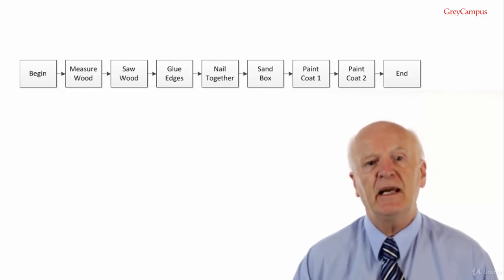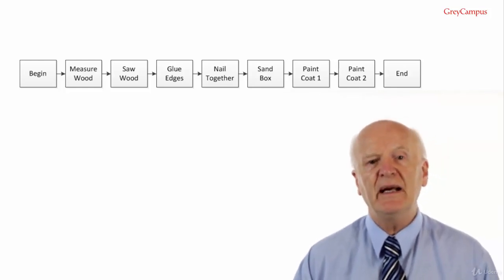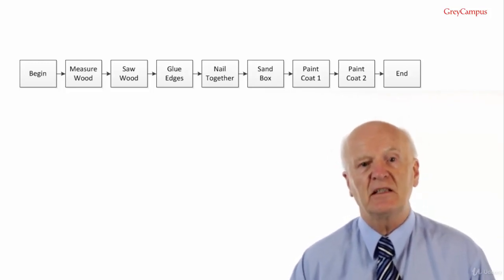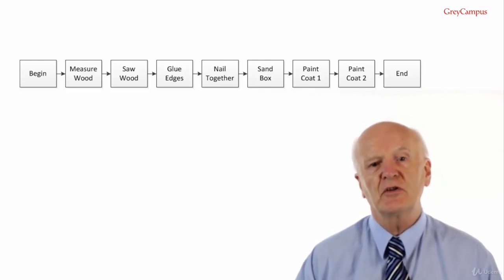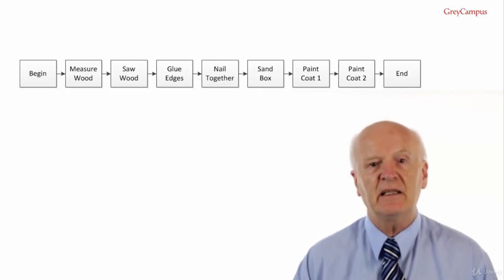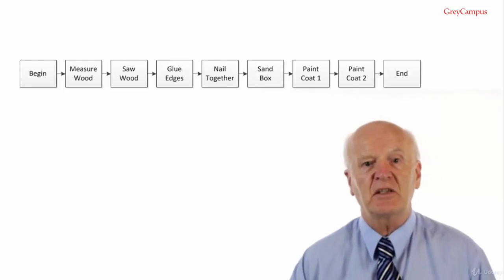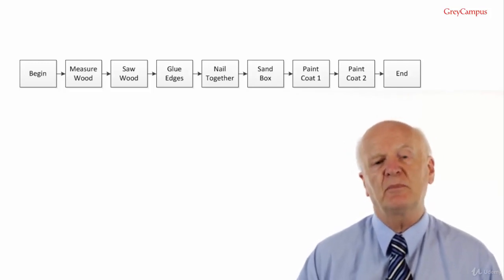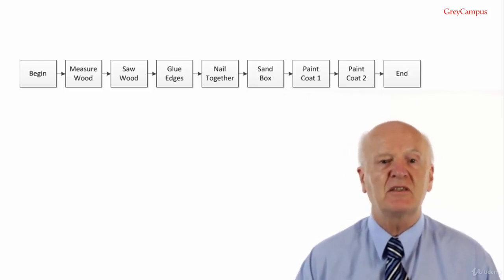It is called a PDM network, which stands for Precedence Diagramming Method, because every activity in our network has a predecessor, which means an activity that comes before it. And you can see that every activity in the network also has a successor as well. You may have noticed that there are 2 dummy activities called begin and end. This not only ensures that every activity has a predecessor and a successor, but in real projects, PDM networks are large and branch all over the place, and it can be very difficult to tell where they actually start and finish. And so adding these 2 dummy activities reduces confusion and mistakes.